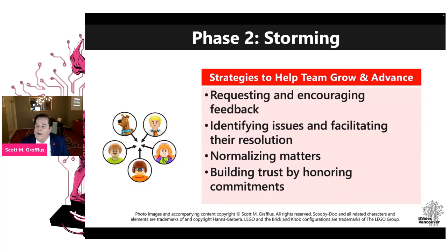Let's say you have an agile team. You don't have to, but for this example, let's say it's Scrum. And let's say that every workday from 9 to 9:15 local time, in person or virtually, the team gets together, and typically it's: what did you do since the last meeting? What are you going to do in the new workday? And any issues or impediments. The format isn't important. Those are just what's typically asked in most organizations. And let's say you're going to do that every workday.